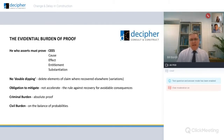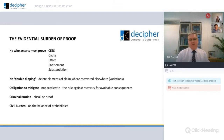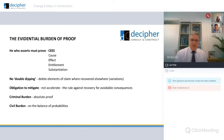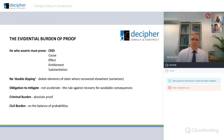Be careful not to do any double-dipping — any prelims claimed in variations at the time of the delay can't also be claimed in the delay. You have an obligation to mitigate, but not accelerate, the works. There is a rule against recovery for avoidable consequences. The criminal burden of proof doesn't apply; we're governed by the civil burden — on the balance of probabilities, or more likely than not. Your evidence needs to only reach the bar of 51 percent. Once you've got to 51 percent, it is more likely than not that what you're contending is correct.